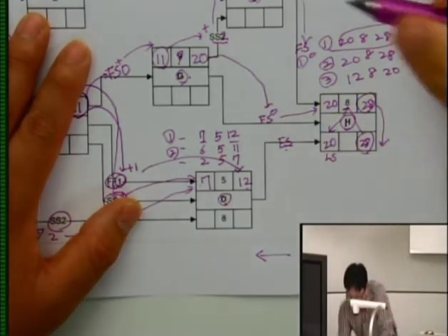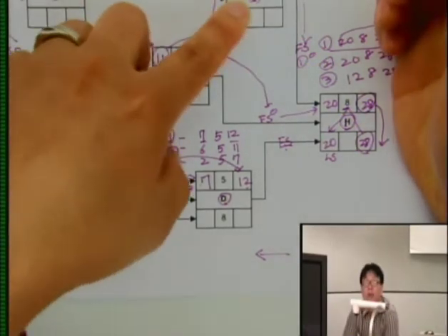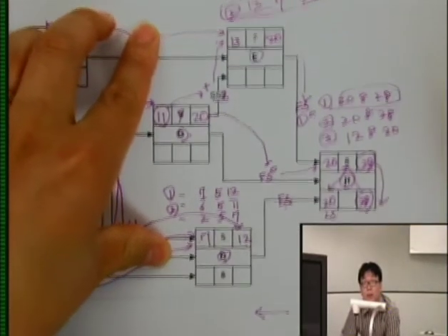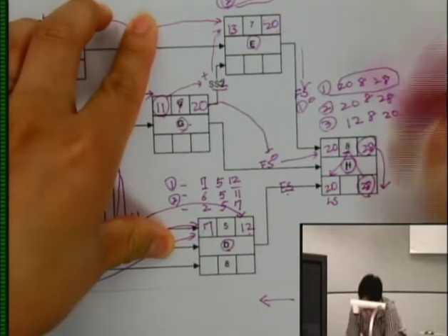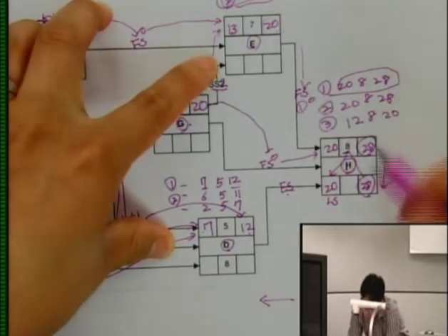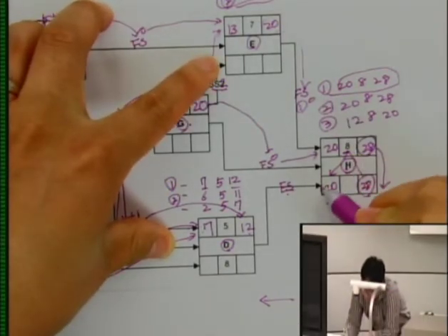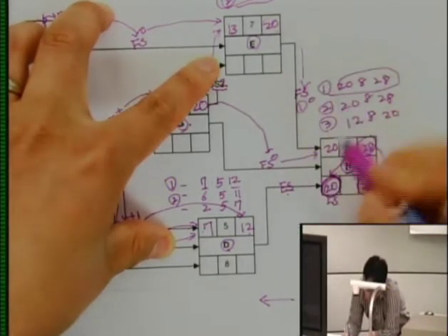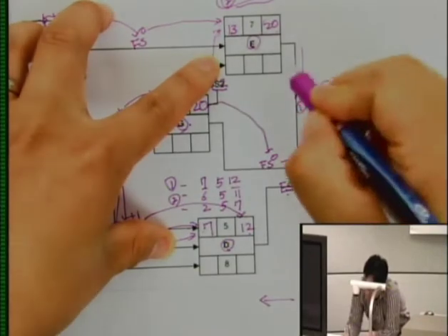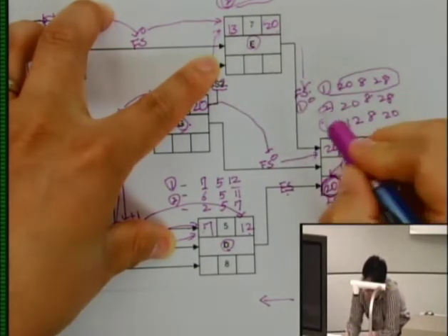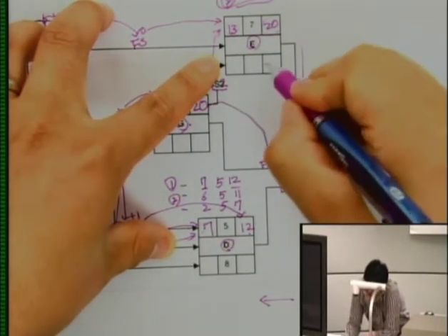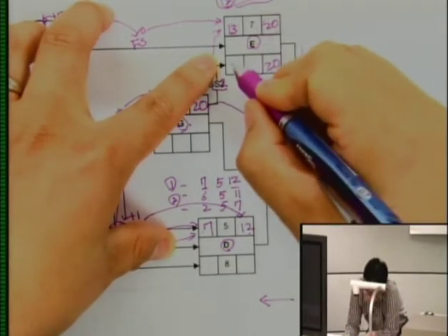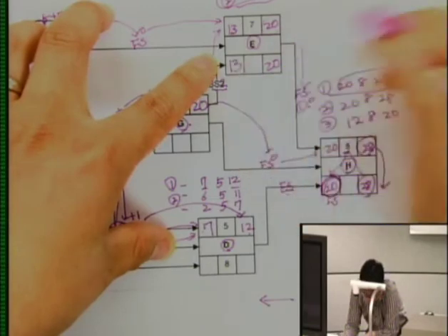Let's look at activity E. This is the finish to start. So what that means, the start of your successor becomes your finish. Finish to start. So start becomes a finish. So 20 minus 0 becomes what? 20. So your duration is 7, so your late start day will be 13.